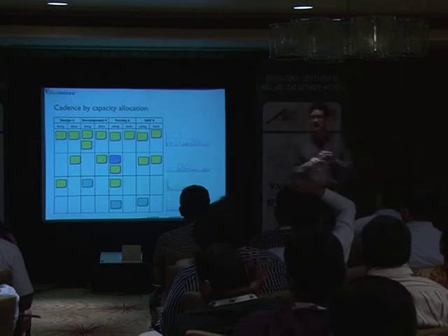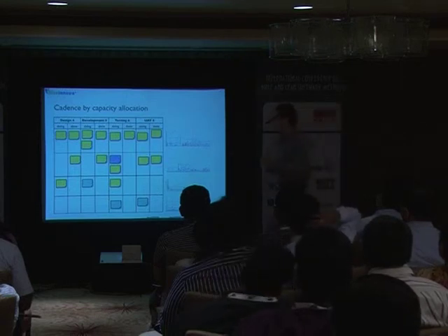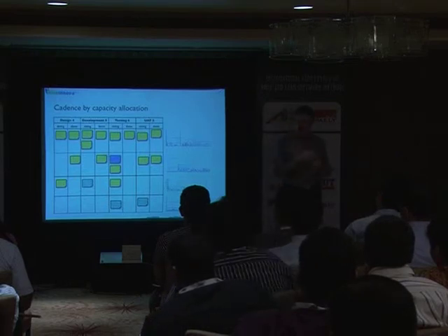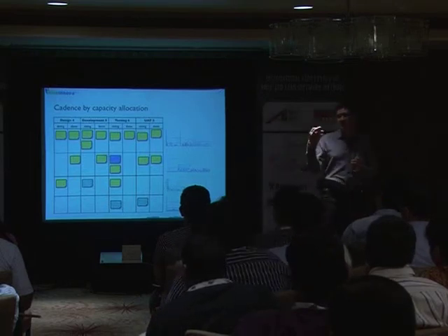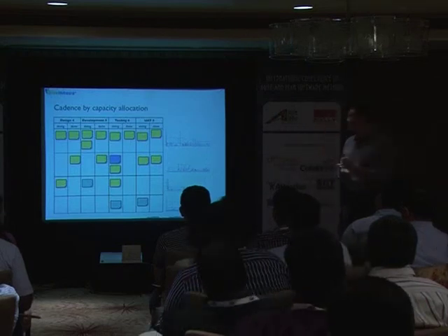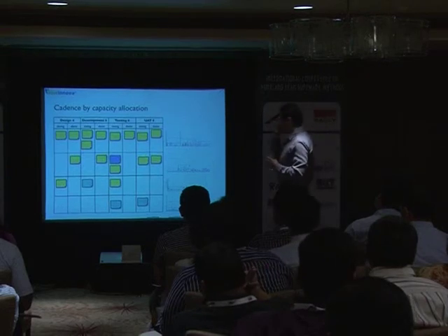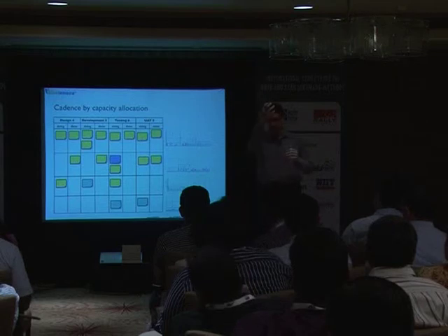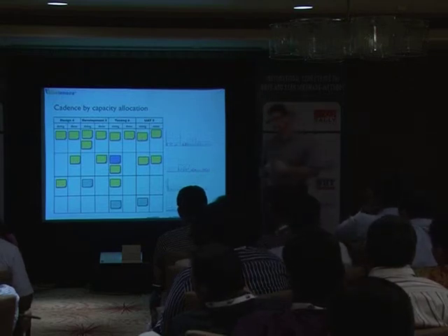Okay, so this has to do with Kanban, which doesn't mean you cannot do it with Scrum. So what those numbers mean is the maximum number of tasks that you want to have at that step. And this is what, at the beginning of the talk, I mentioned that in Scrum you have only 1 week limit, which is the number of tasks on your sprint backlog at the beginning of the sprint.